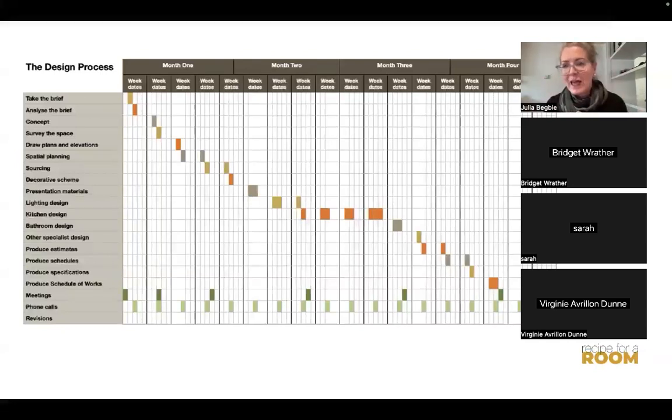Same spreadsheet, different tab. I've created a Gantt chart, and the column down the left-hand side is just a cut and paste of the column down the left-hand side on the previous spreadsheet. So it's just those same tasks listed again over a period of time. And where I've said I'm going to give 2 days, I've blocked out 2 days. Where I've said I'm going to block out 8 days, I've blocked out 8 days. And I'm proving to myself that I do have time. I can fit this in to my busy schedule with my other clients, and this is when I'm going to do it. It gives me guidance for the client of how long this project is likely to take, but I don't tie myself to that. I don't undertake to commit to that. But that is how I know that I'm going to be spreading my fee over 4 months, because I've actually worked it out.